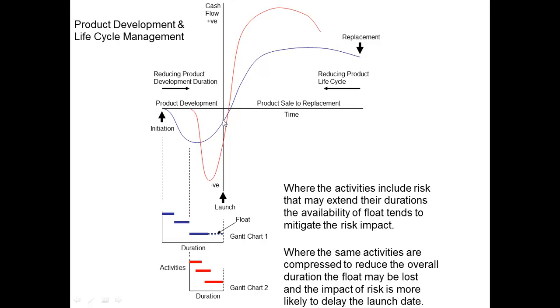If you go back to the S-curve, the previous overhead, then we're talking about the same spend in here, but we're representing, instead of adding it up as previously, we're showing it incrementally over the duration of the product design and development process. So we then come to launch again, and if we look at the blue here, then we move from negative, that is the budget for the development process, into positive cash flow, which is the profitability from sales. So that's this part.